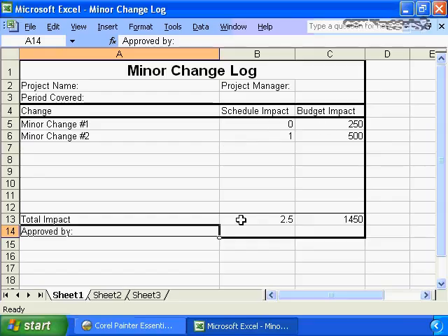You're consolidating these over a period of time, and you are submitting them for approval. You're simply streamlining the process because you want to ensure minor changes are documented, minor changes are reviewed without adding so much bureaucracy to your project that people sense it's mired in change management as opposed to moving forward for